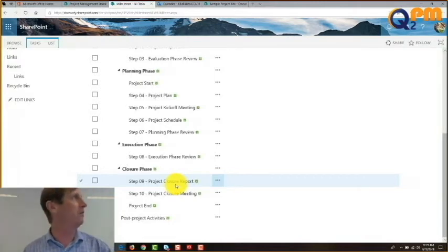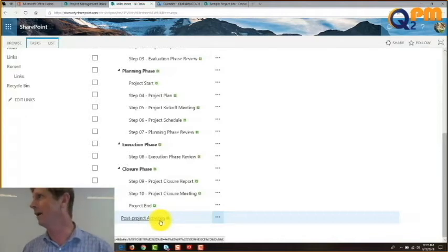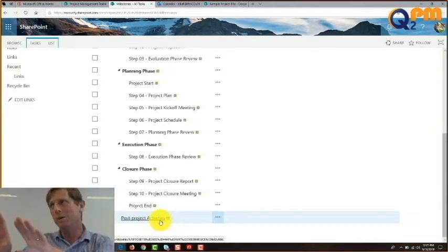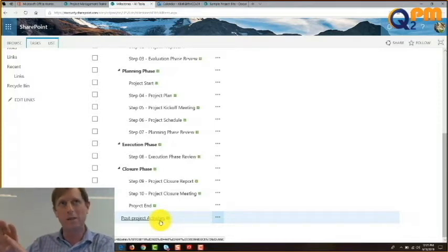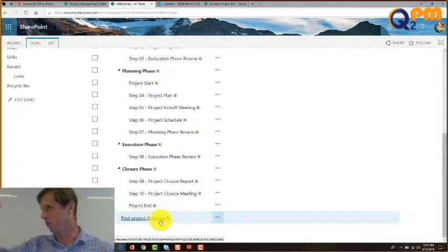And we cover that in a very last piece down here, the post-project activities. I'll explain more about that later. During the course of the project, people are gonna show up with stuff that they want that wasn't part of this. It's okay, we got a place for it, right? Yeah, that's good. We know that you also want to add another tour, you also want to visit, you know, Beijing as well, as it wasn't on the list. Okay, maybe we can't do that in this time, but we'll add it to the post-project activities or something, next tour.